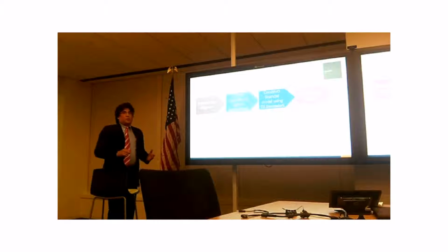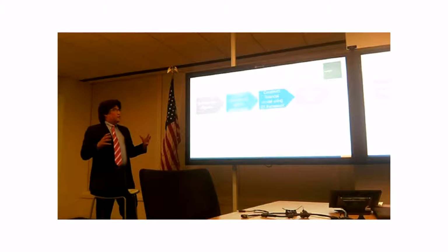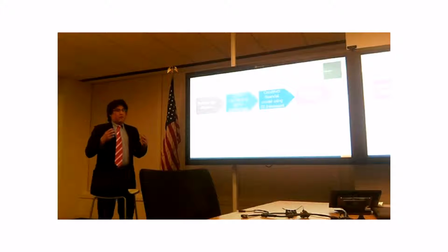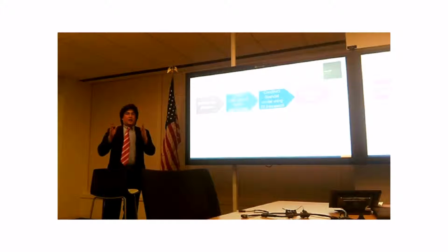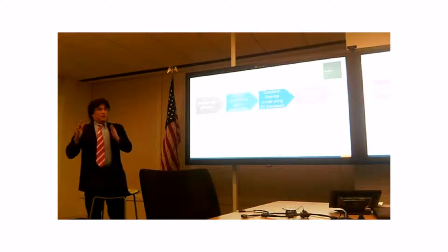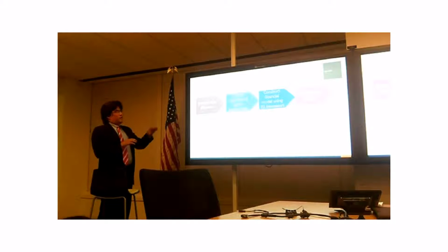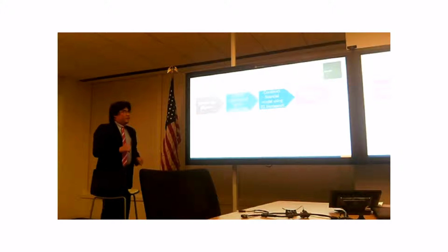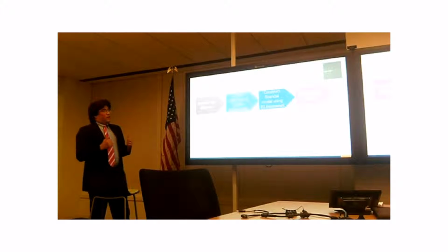The first one, perform due diligence. That's really understanding what is the lay of the land. What is the overall comprehensive inventory of all my costs? How do different business processes interact with each other? What are some of the areas that I need to highlight and understand from a process perspective and say, there might be a cost savings in this space, or there might not be. So that's what you do first. The second thing you do is you go out and you identify the stakeholders, you set up interviews, and you capture documentation that they may provide. And so all of that is this phase.